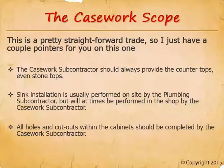All holes and cutouts within cabinetry should be completed by the casework subcontractor, including grommets in countertops and cutouts for conduit raceways or plumbing piping throughout the casework. If electrical and plumbing subcontractors drill their own holes through casework, be sure those holes are only drilled in locations approved by the casework subcontractor so they don't cut through splines or other structurally important components.